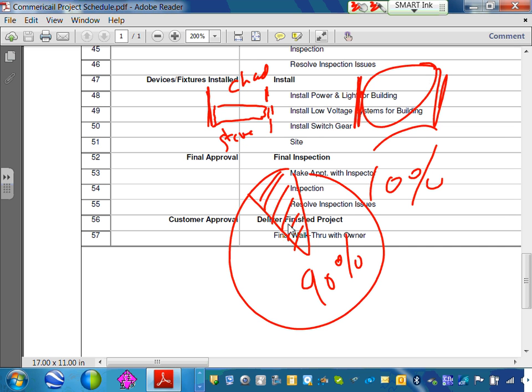Every discipline has tasks assigned resources. And when we do estimation, guys, we assign resources. Copper, we know, like Hunt and Egan, they would know how much copper they have used every month on this particular project, or even sometimes they can go all the way to a week. And if they're ahead or behind, they can tell you. They don't want to be surprised. And money, especially money, weekly, they know how much money they spend on the project, everything. So they know they're above or below. And if they're way above, they've got to do something.